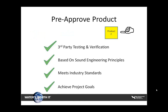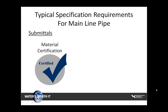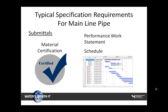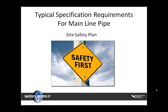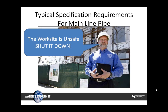What you're left with are products that have the best chance of success. Typically, an inspector will review submittals provided by the contractor and manufacturer, including material certifications, third-party testing data, the performance work statement, and a project schedule. Specifications will typically include safety items the contractor must follow. In some cities, the inspector has authority to shut down the job when the work site is unsafe; in other cases, the inspector documents and relays the information back to the city.